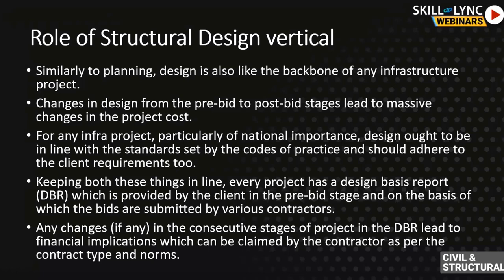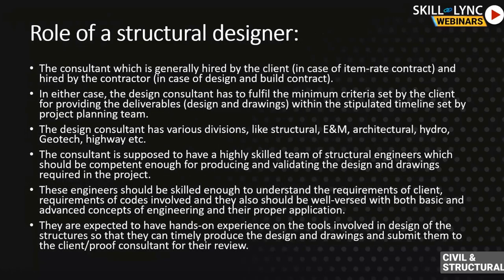Any changes in the DBR in consecutive stages lead to financial implications which can be claimed by the contractor as per the contract type. As a structural designer in a metro project, the consultant — hired by the client in an item rate contract or by the contractor in a design-and-build contract — must fulfill minimum criteria set by the client. The deliverables are the design and the drawings. Timely submission is very important because delaying one drawing by two days can affect execution by ten days and alter the cost.